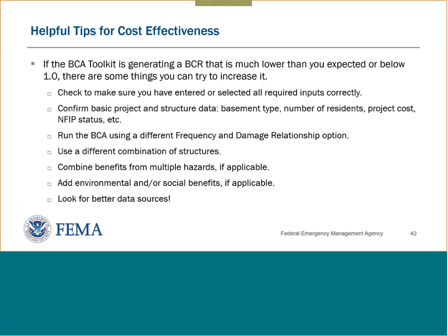Things you can do to try to increase your benefit cost ratio: make sure that all your inputs are correct. All it takes is a transposition of a couple of numbers to cause your benefit cost ratio to sink below 1.0. This happened to a project several years ago when I was with the state of Washington, where the benefit cost analysis was the last thing put together in the application. It wasn't checked well, it was submitted. Well, it did not get funded.